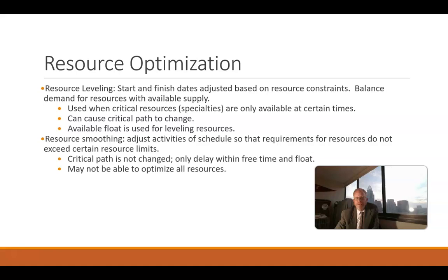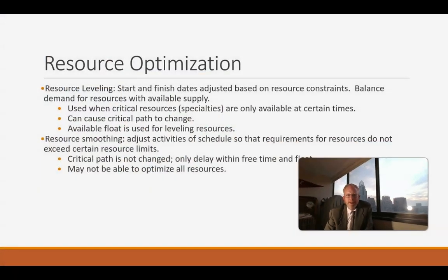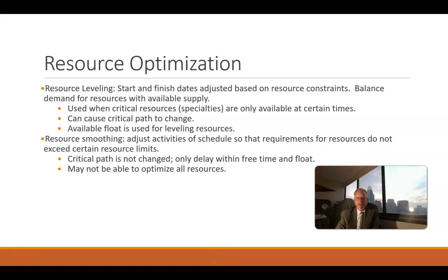If we can't adjust using float, that gets a little more tricky because then we have to look at changing the finish date of the project. But there again, better to know that sooner rather than later, so that if you're building a building and you have tenants moving in, you can let them know with plenty of time to prepare that there might be a delay in their move-in.